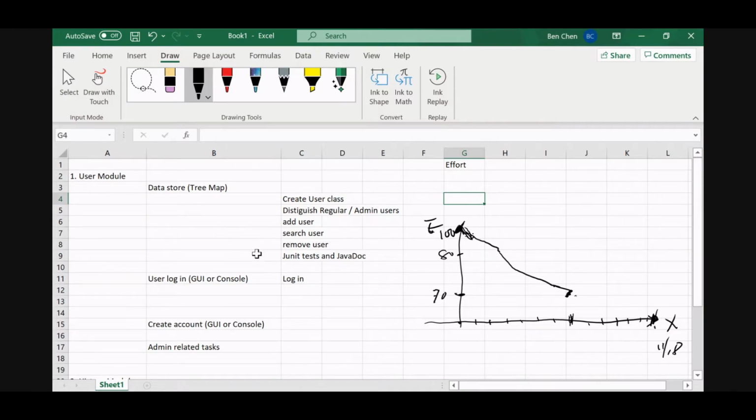If you want to do the traditional waterfall way, then it doesn't matter, you can mix them all together, but we try to avoid that. We try to finish each task so you know how much you finished. Otherwise, you get everything spread out, 2 hours here, 2 hours there, 5 hours there, so you don't really know how much progress you made and how many more hours you need down the road. So that's not a good idea.